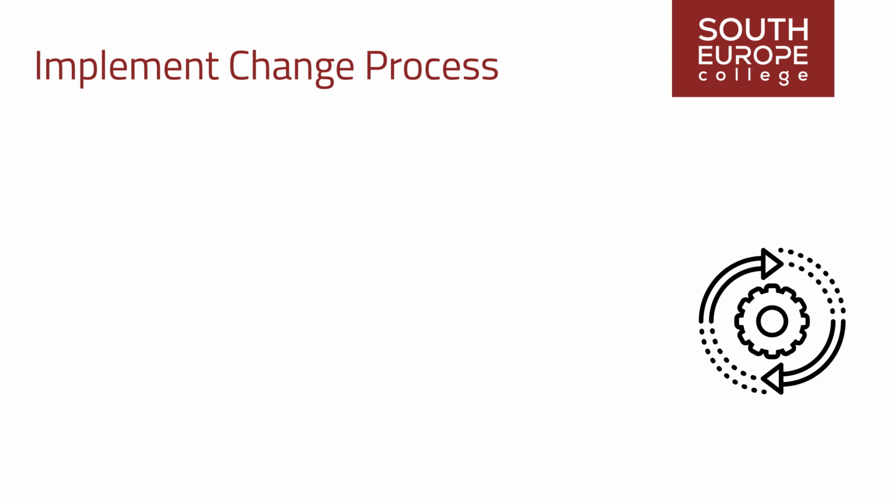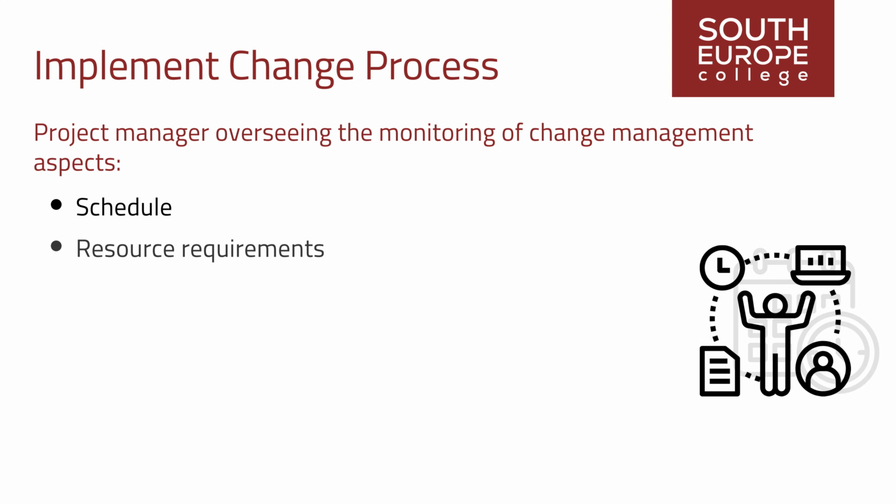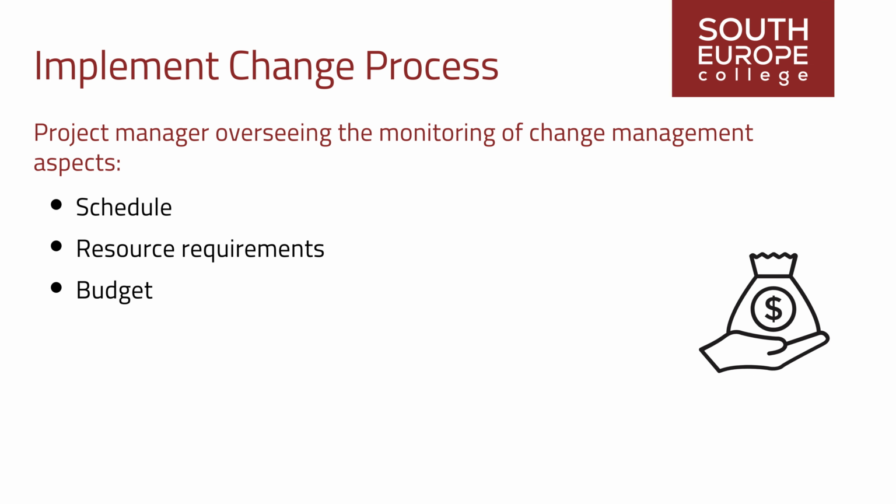Project implementation and change implementation share similarities, with the project manager overseeing the monitoring of change management aspects against the schedule, resource requirements, and budget outlined in the project management plan. Risk responses in this context tend to be more iterative, requiring frequent adjustments compared to standard projects.